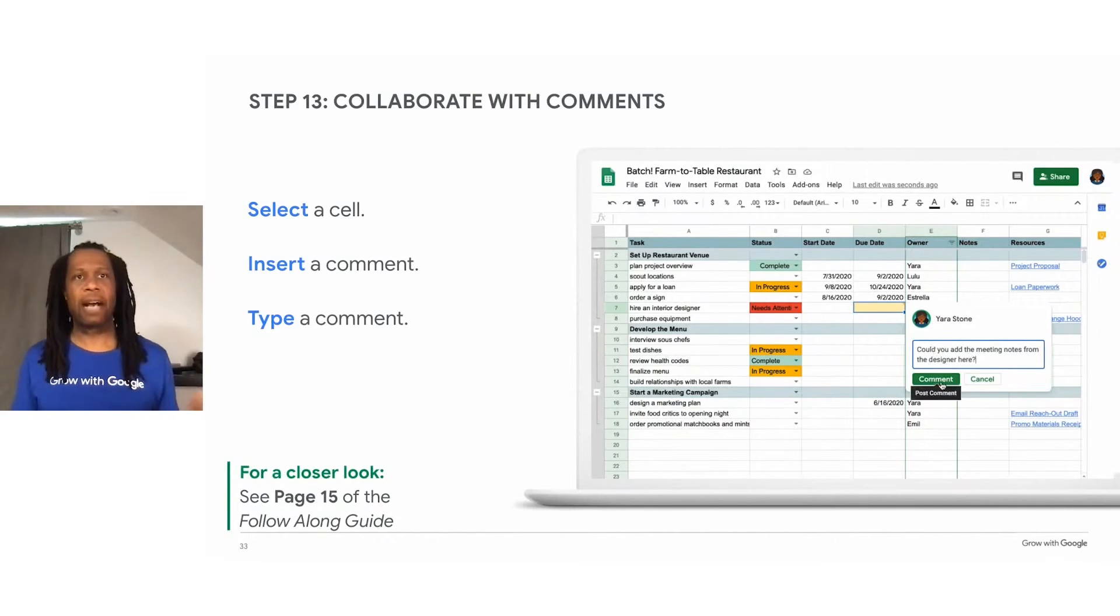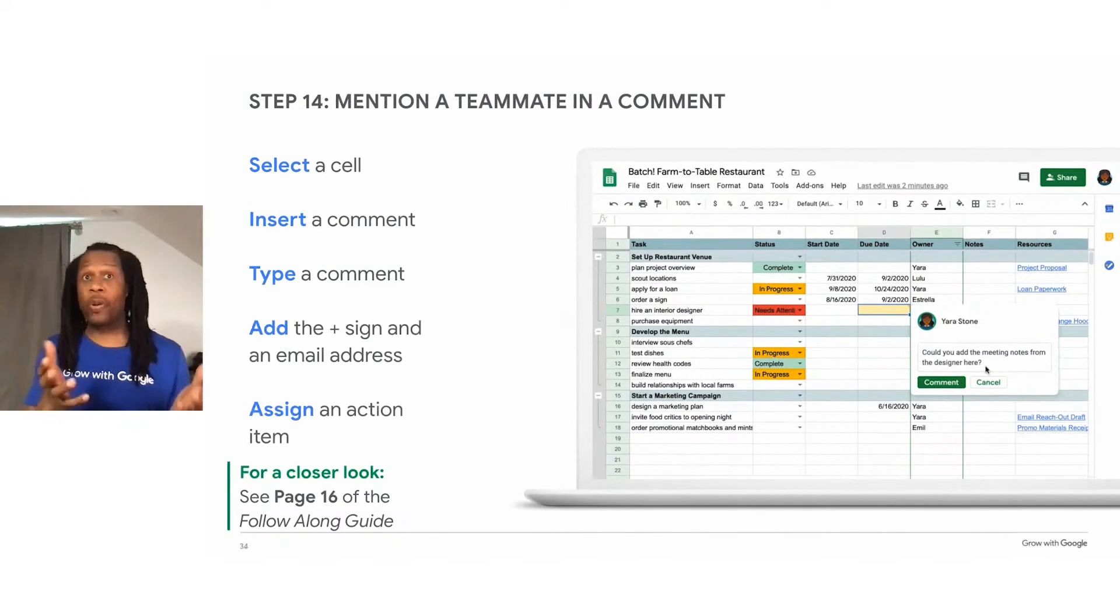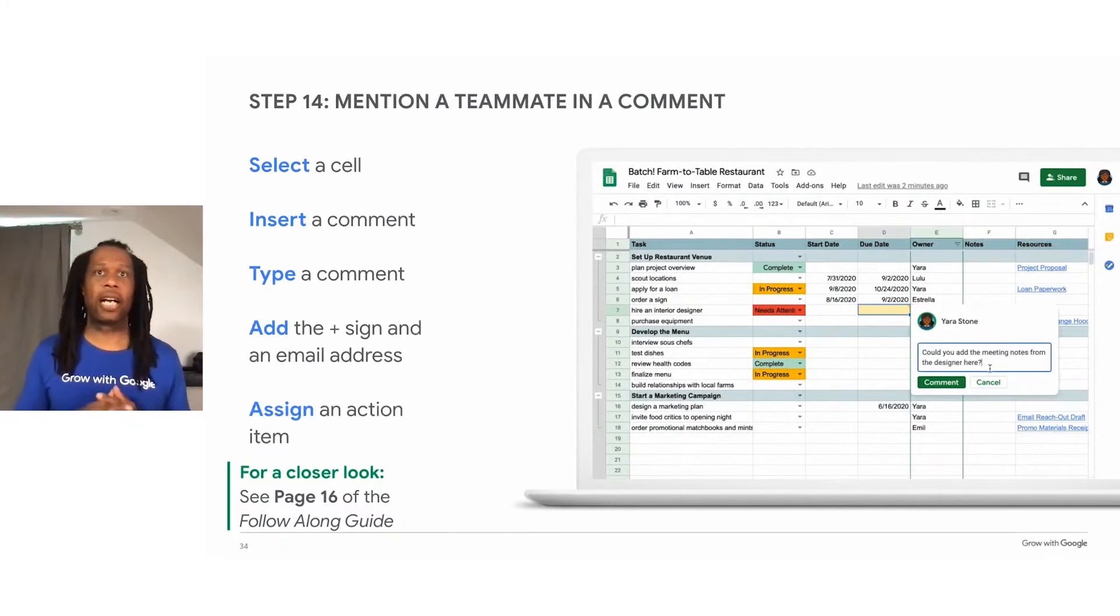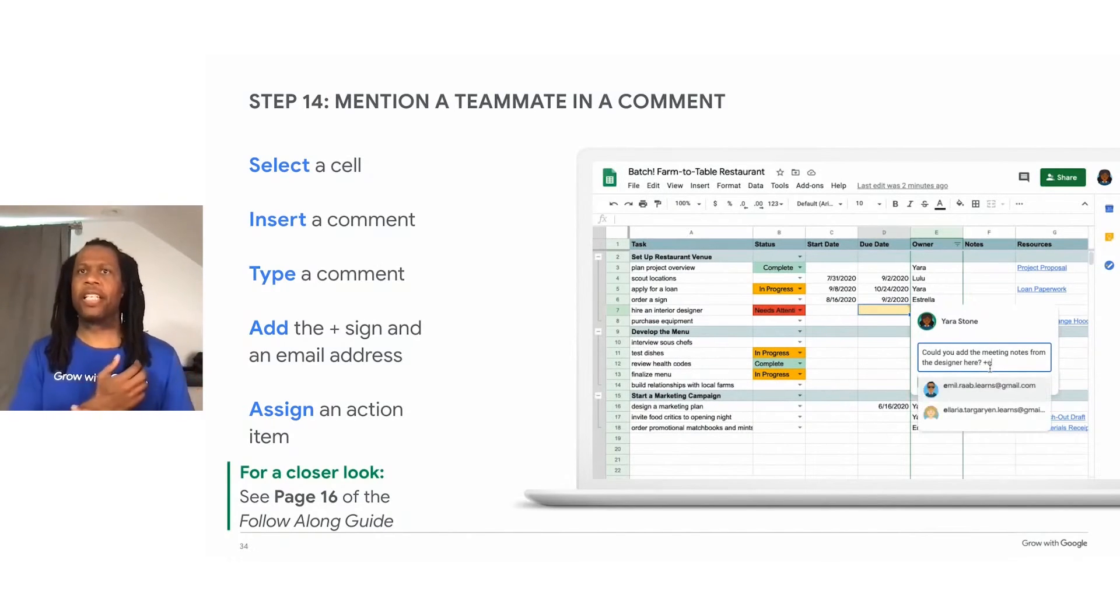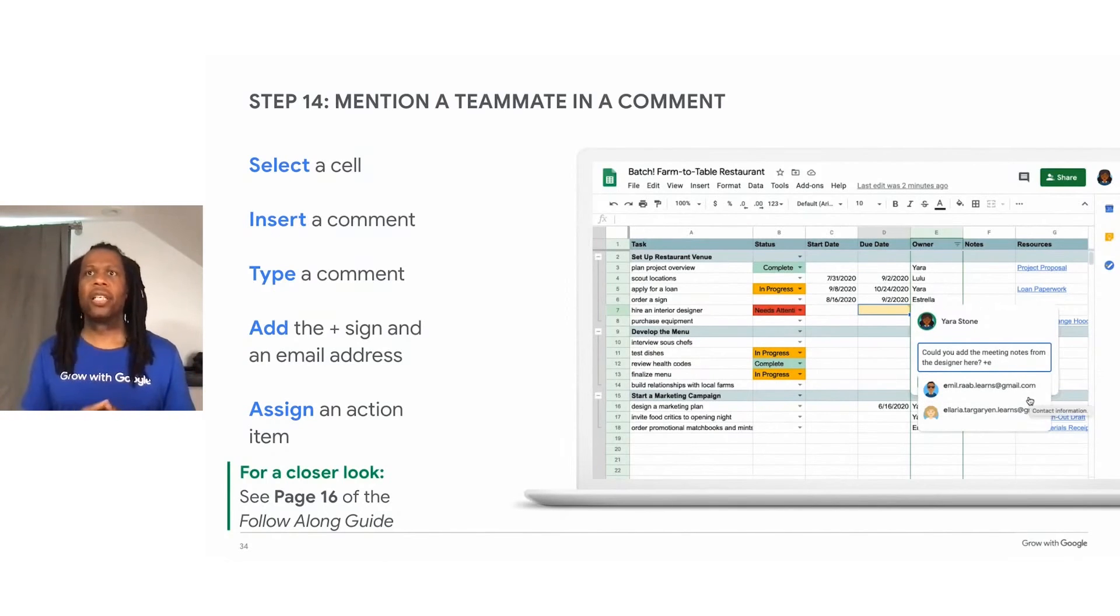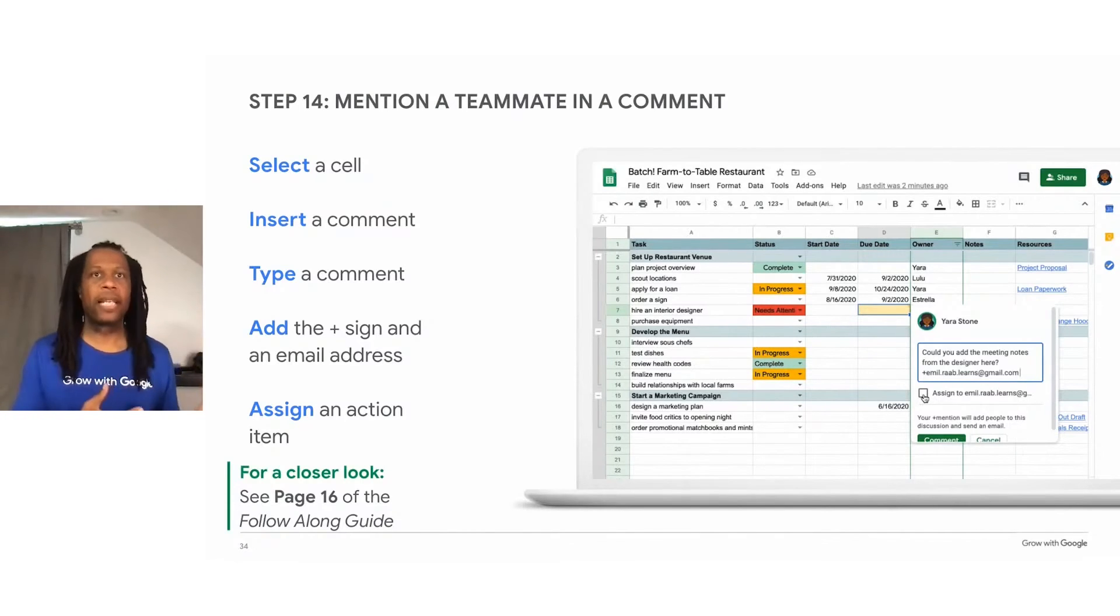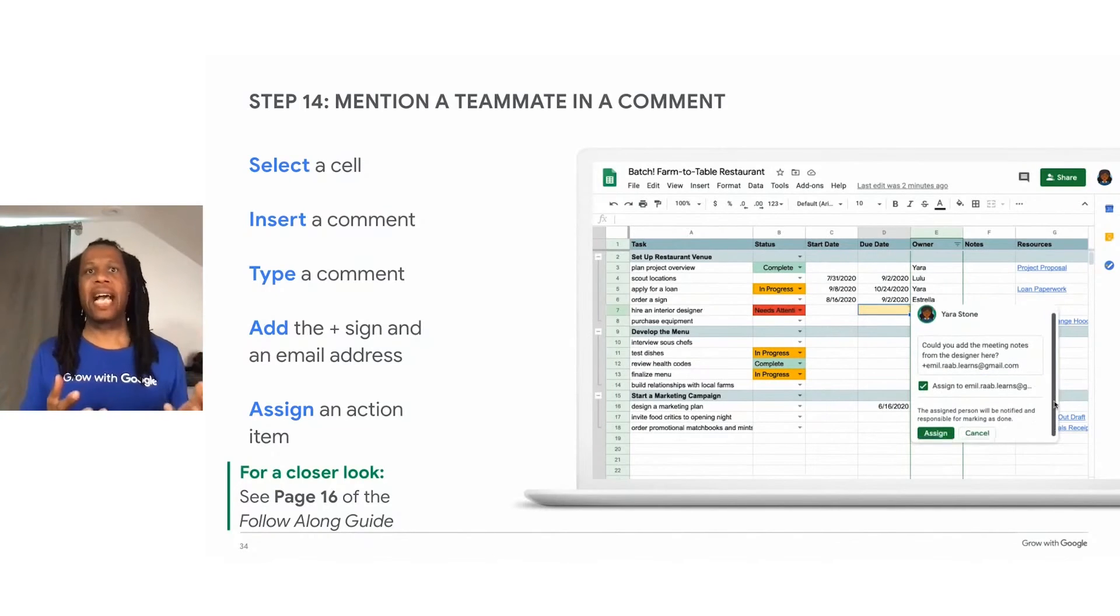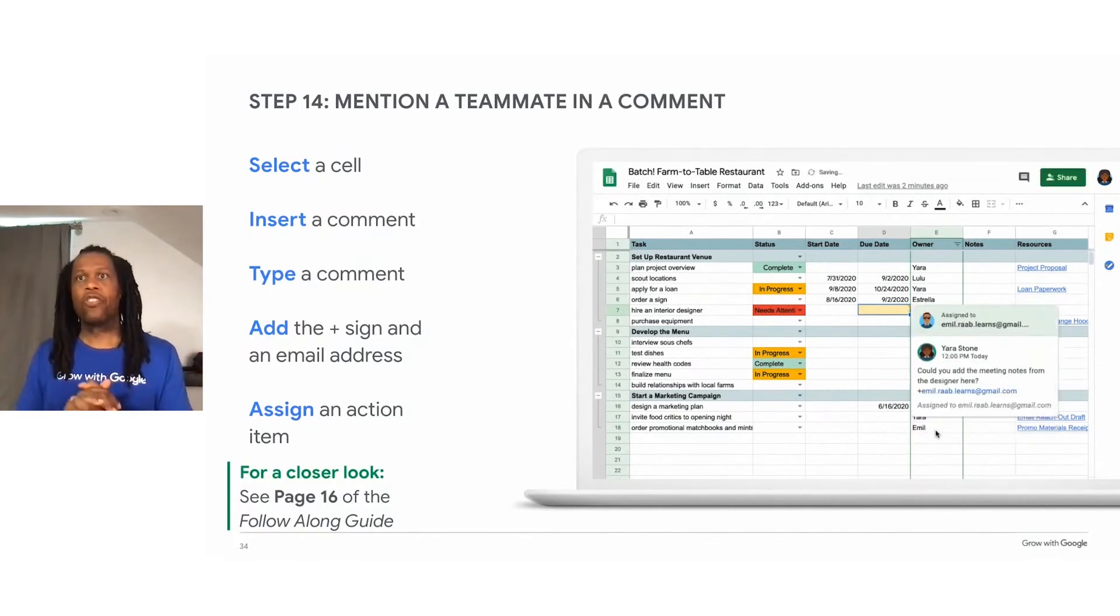So you can simply select the cell that contains a due date, insert a comment, and then write a short reminder or question about that task, and then click comment. So when you add a comment, you can also designate someone on your team as the specific owner of that issue. To do this, you would type the plus symbol and then add their email address. And you can ask for an update.